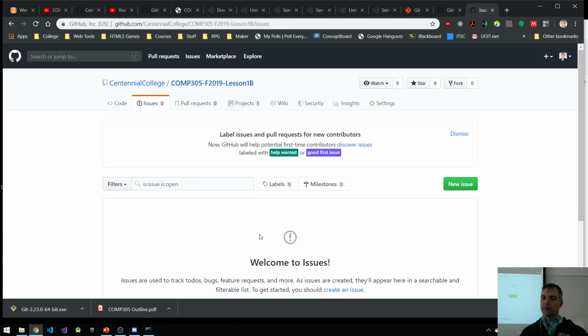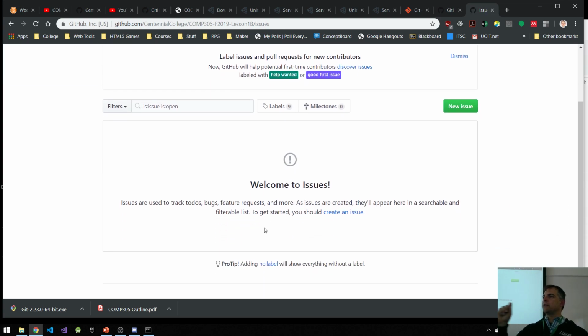So here are my issues, right? Think about issues as a feature that I'm going to add in, or it could be a bug, or a fix, or something that I want to add in. For example, the first thing I've asked you to do is make a start page, and the start scene might have some kind of menu, right? A lot of times we write it from a user perspective, like this: as a user, I would like to be able to start my game by pressing the start button. It could be something like that, all right?